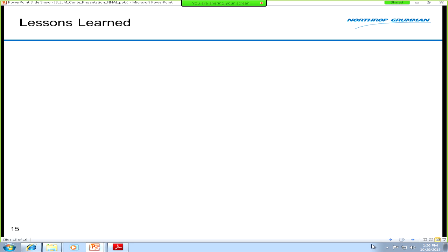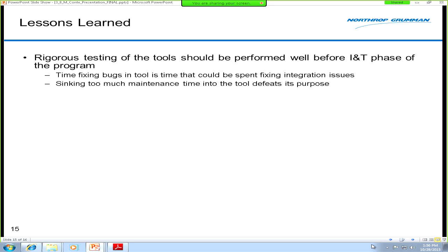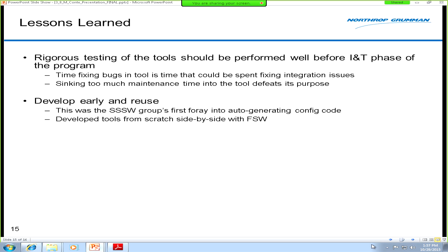A few lessons learned from our auto-generation approach. The most important: the tools need to be finalized as soon as possible — well before the INT phase, and preferably at the very beginning of the program. We didn't do a thorough enough job testing the tools, so now that we're using them almost every day, we're discovering new bugs and problems in the files they generate. Any time spent maintaining the tool reduces its usefulness. Develop the tools, test them, and make sure they're correct before moving to later phases. Requirements and formats will change, and some maintenance is inevitable, but you don't want to be fixing tool bugs during INT — you want to be fixing bugs in your flight software.